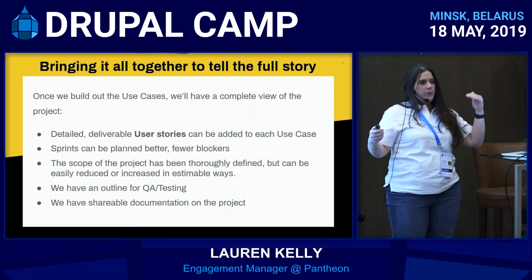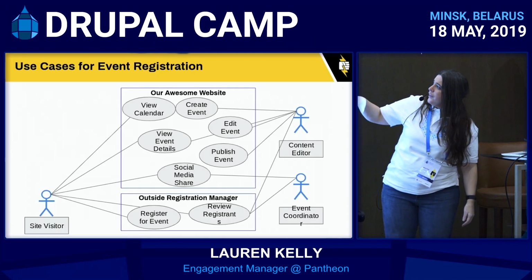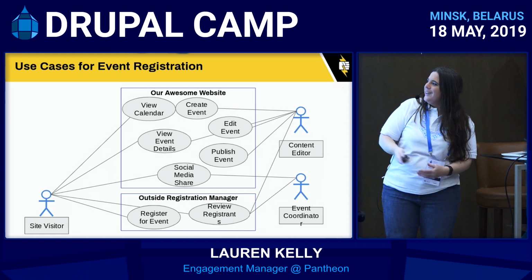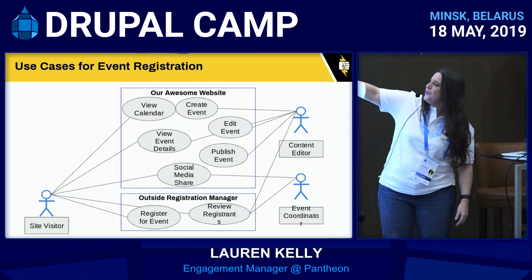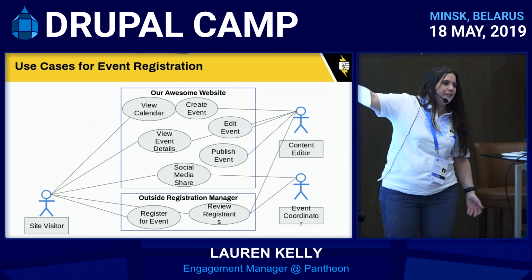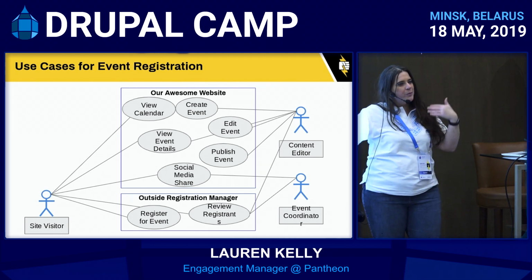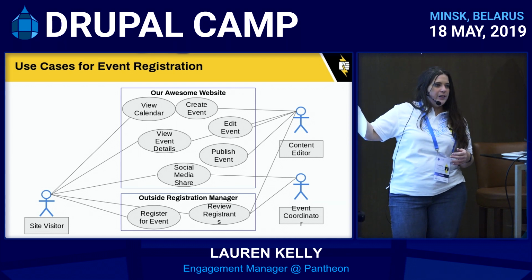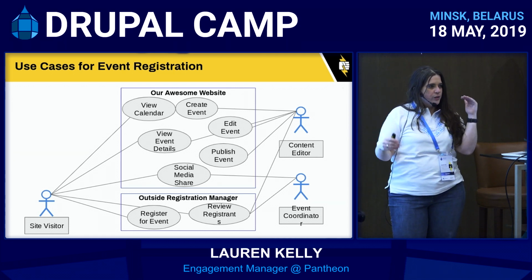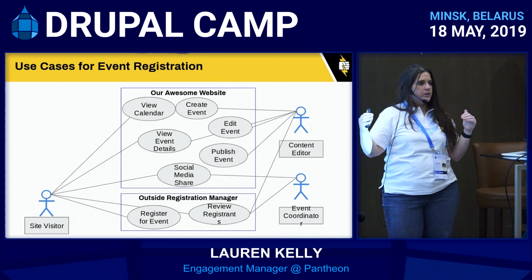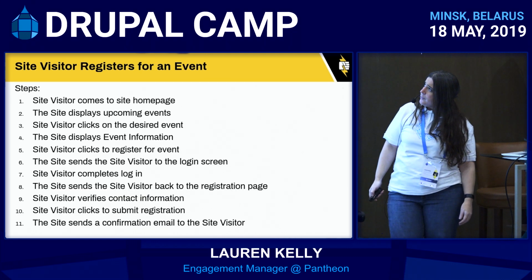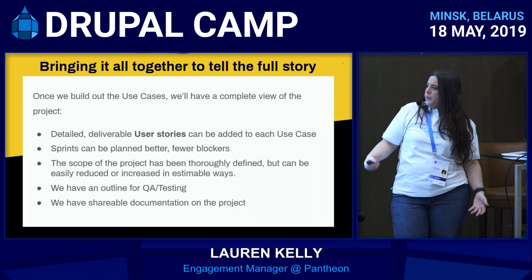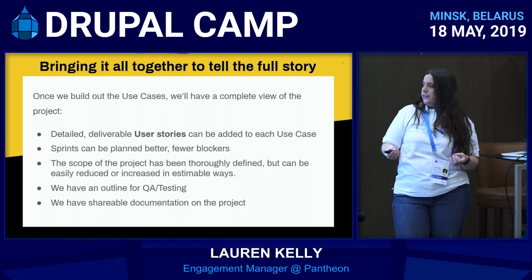We know from that process of looking at this, sorry to keep going back and forth, that we can see on here, you can't do edit event before you do create event. I mean, that one's a no-brainer. But as we get more and more complex into projects, you can see here what things happen, and you can determine which things are blockers for others, and you can detail out those relationships. And the scope of the project has been thoroughly defined.